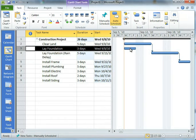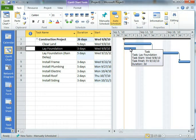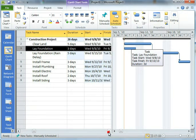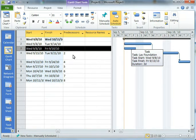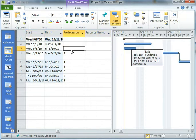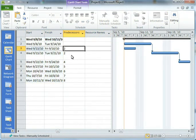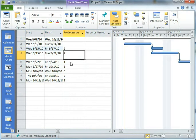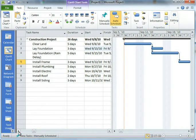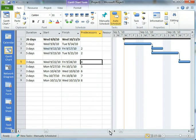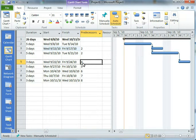Well, the dependencies are not set properly for the activity that I copied. It doesn't automatically build those dependencies. So I'm going to set the predecessor items here to make sure that these are all linked together. So for example, both rain delays should be preceded by activity two. And then activity five here, which was whatever we do after the foundation is done, installing the frame apparently, should be dependent on both three and four.